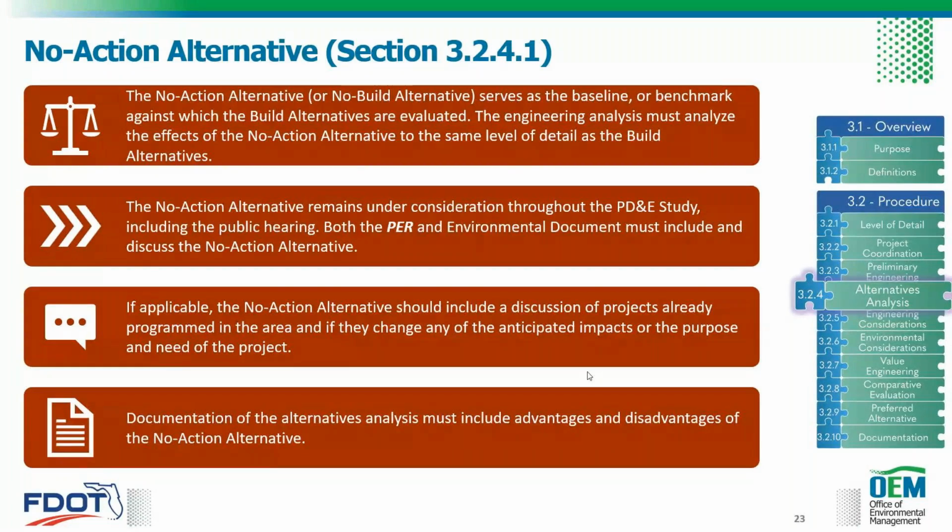Documentation of the alternatives analysis must include the advantages and disadvantages of the no action alternative. So some advantages might be no right-of-way impacts, no environmental impacts, no construction delays, those types of things. Disadvantages could be if the traffic continues to decline, or if